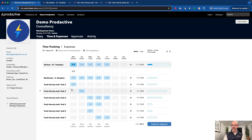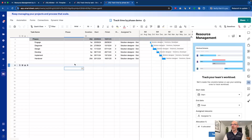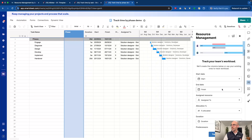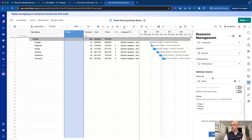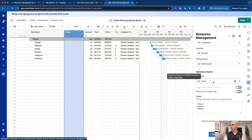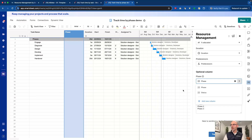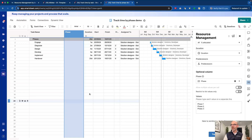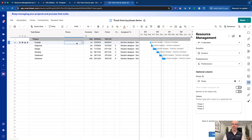Let's show you first the phase and how you track by phase. If you want to track by phase, you can insert a new column or you can ask Smartsheet to insert the new column for you. You go in the same way you would enable resource management by setting up resource management here, and it's asking you which columns you want to use for what. An optional column is phase. Here it's saying which column I want to use, and it needs to be a drop-down column. So I've inserted a column here called 'Phase' with Phase 1, 2, 3 as the drop-down values. If I click that, it's going to start enabling me to track it using the phases. That's useful, but you've got to manually update the phases — maybe not as useful unless you start having formulas which do that bit.